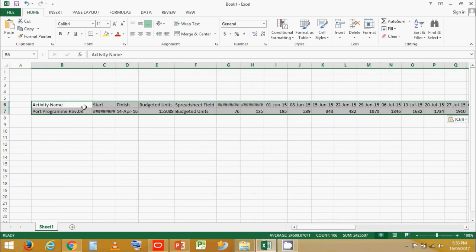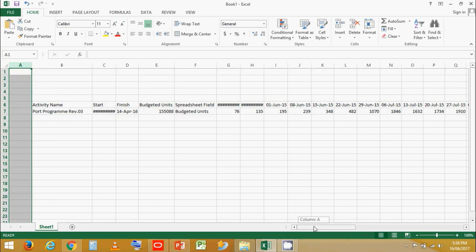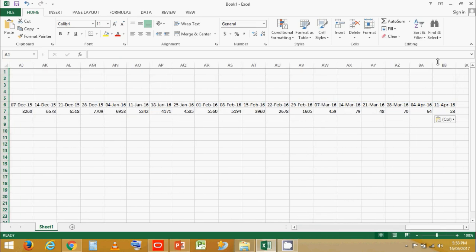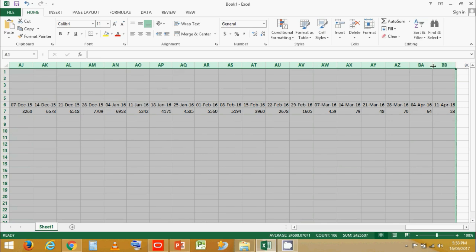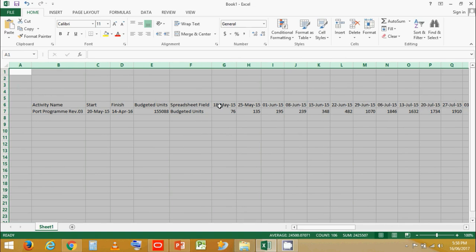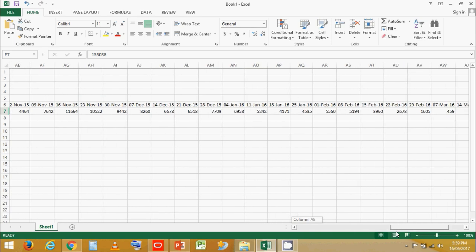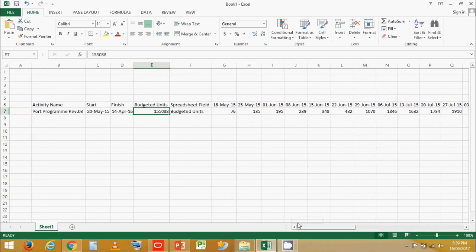You'll see that some columns are not clearly visible, so let's select all the columns and double-click so that all columns are equally distributed and the data is visible. This is the total budgeted labor units assigned to a project, distributed over the time scale of the project based on project activity planning and resource assignments.